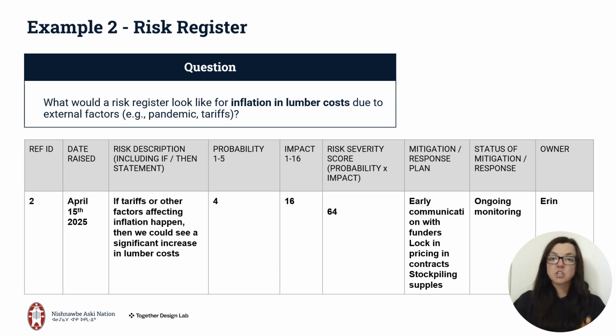The mitigation or response plan will include early communication with funders, locking in prices with contracts and contractors, as well as stockpiling materials and supplies. The mitigation or response status.